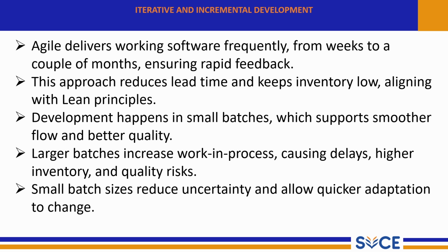The next point is that larger batches increase work in progress, causing delays, higher inventory, and quality risk. When too much work is taken up at once, it causes delays and increases the chance of mistakes. More incomplete tasks mean more confusion, more waiting time, and more defects. That's why Agile avoids large batch development.